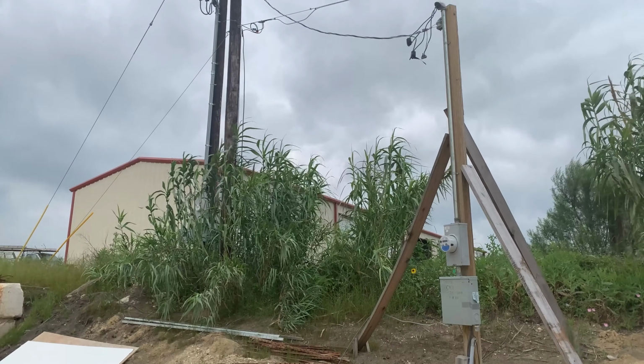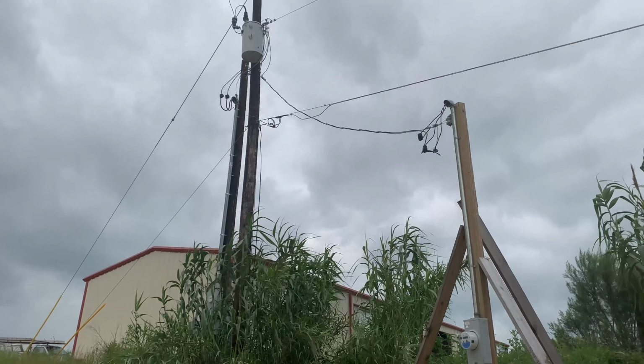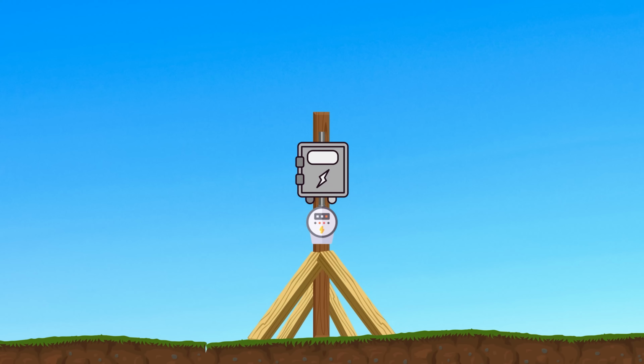Now for that power to be established, you're going to have to place that pole according to whatever your power company's guidelines are, or whatever authority has jurisdiction in the area. So here in the city of Austin, the City of Austin is a government organization. They are the people that have the authority to tell us how power poles, or temporary poles, need to be constructed.